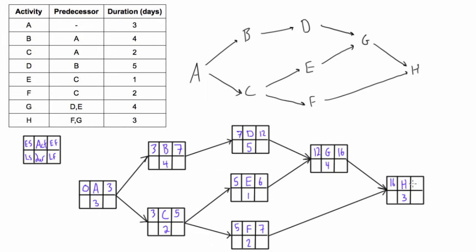Sixteen plus three is nineteen, so right away we know that the planned duration of this project is 19 days. Now we want to find the critical path, so we do the backward pass. We bring the 19 down, and instead of adding the duration we subtract it as we go back. Nineteen minus three gives sixteen. We bring sixteen into both G and F since there are no competing arrows. Starting up at G: sixteen minus four gives twelve.